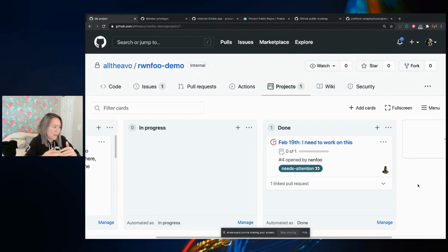And your project manager doesn't need to come in and ask, where are you at right now and the status of this ticket? Have you started working on it yet? Well, they can just check your pull requests. They can see if you close out issues, and they can just use the project board as their own source of truth. And if you close out issues, things will be moved to the done column automatically. So it's a very cool way, a very efficient way to keep everything in one place, and people don't need to check on you to see where you are at your work. You can just leverage all these features to keep it nice.